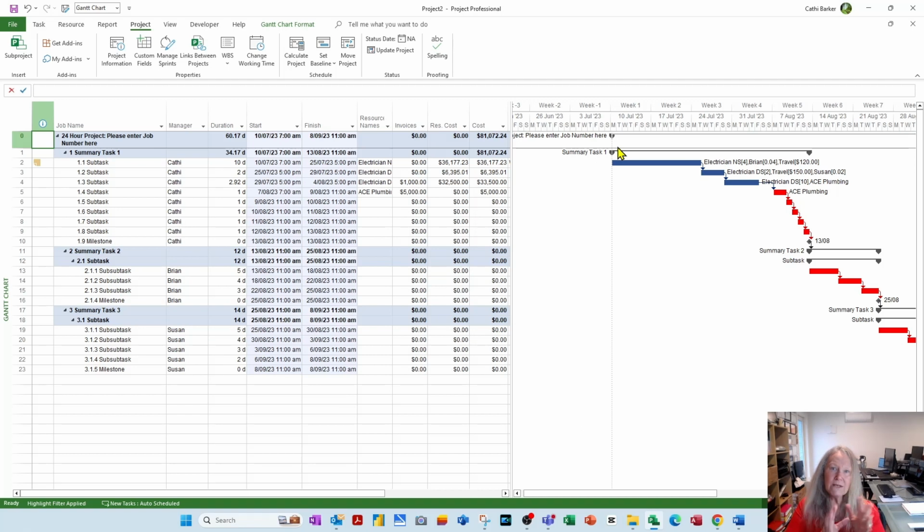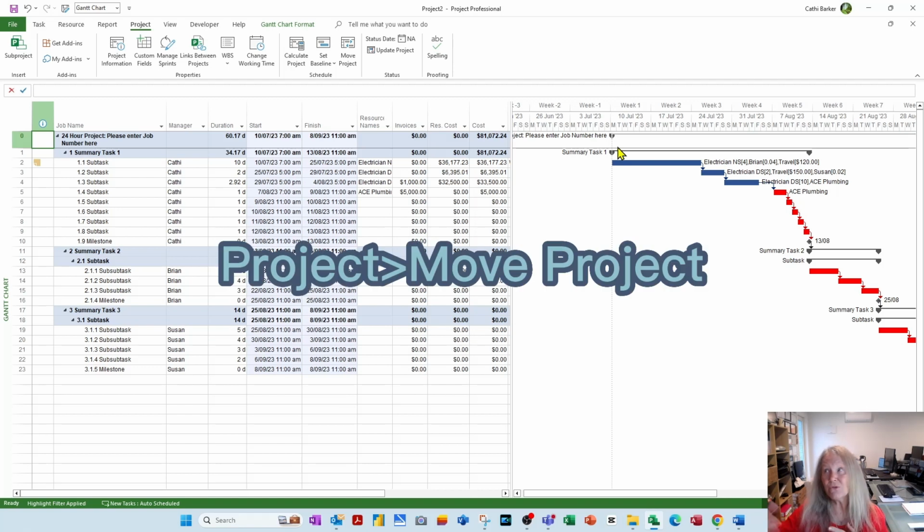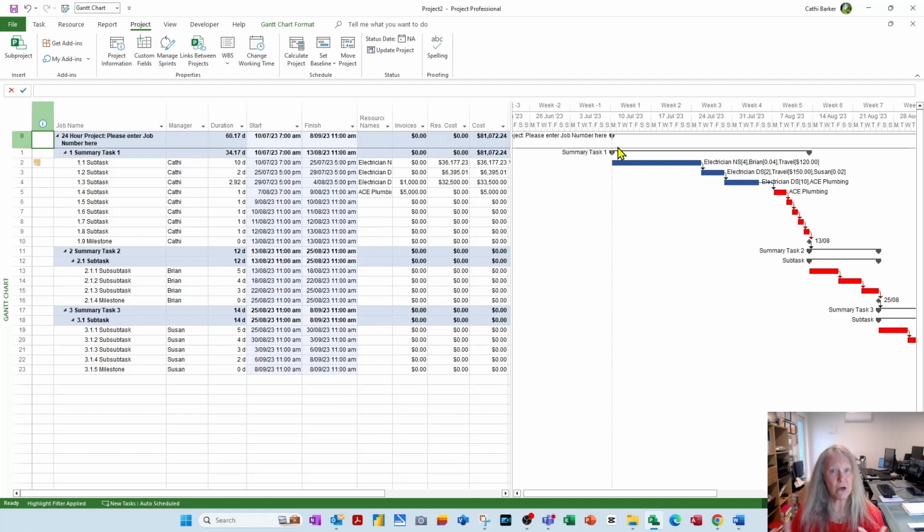So when you make your template, with every day that then passes, that template ages and it remembers when you made it. So when you open up the template, don't freak out that it's getting older. We all are. Just go to Project and move it forward or backwards or to whatever date or time is relevant for that particular shutdown.